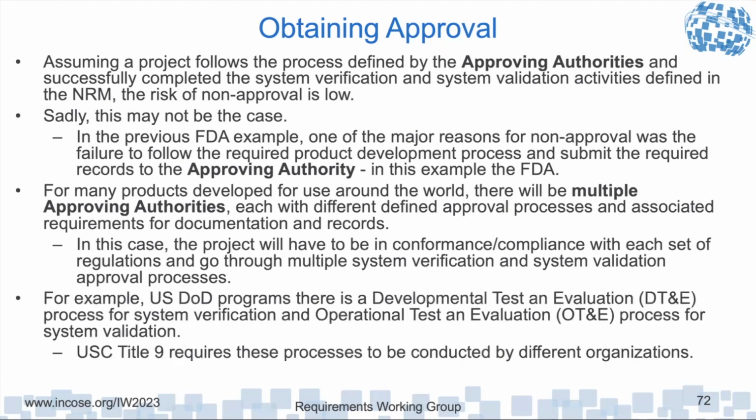And for DoD programs, they have a development test and evaluation process for system verification, and an operational test and evaluation process for system validation. And Title 10 of the US Code says that those processes should be conducted by different organizations.